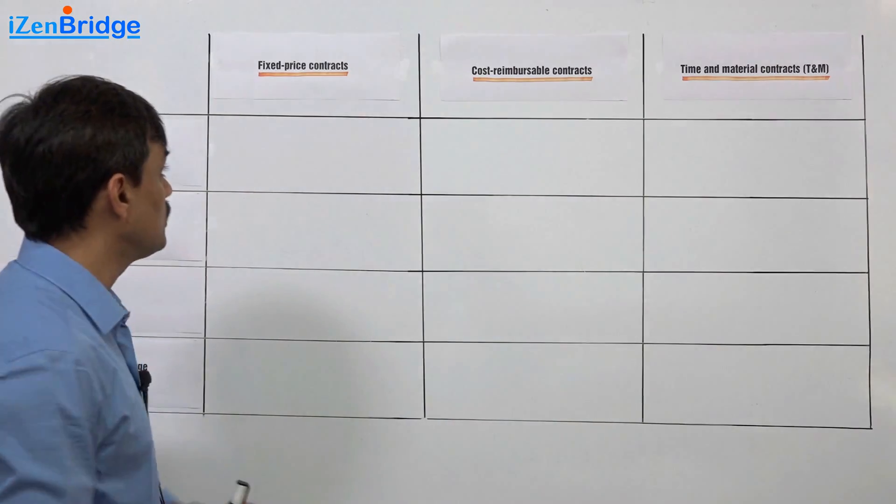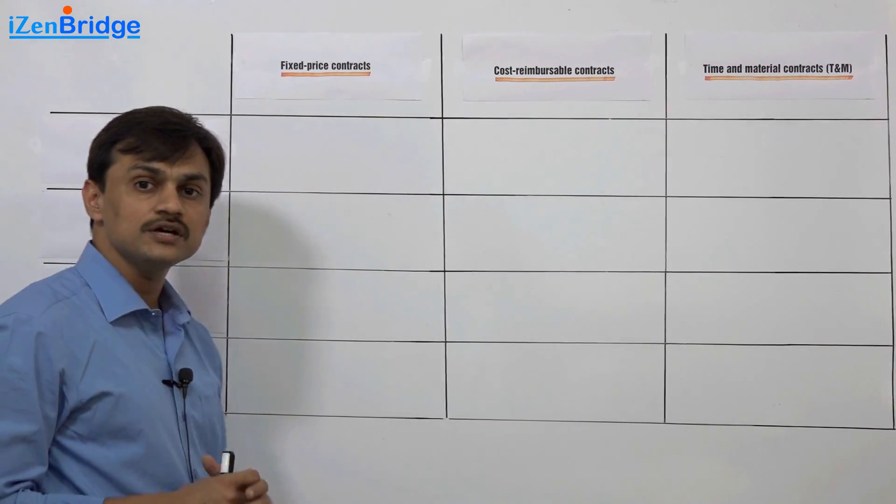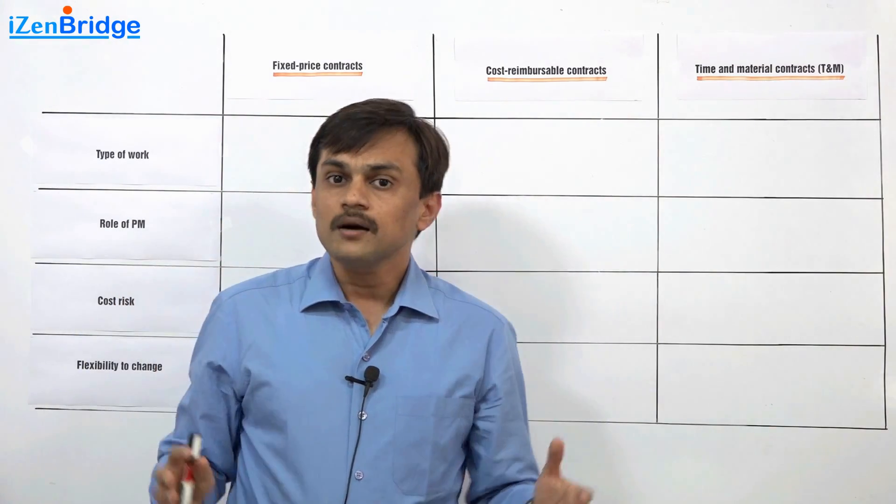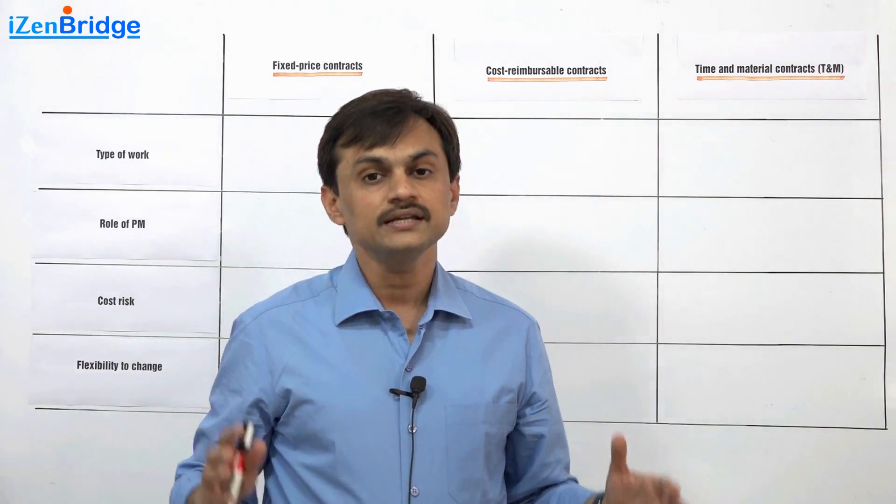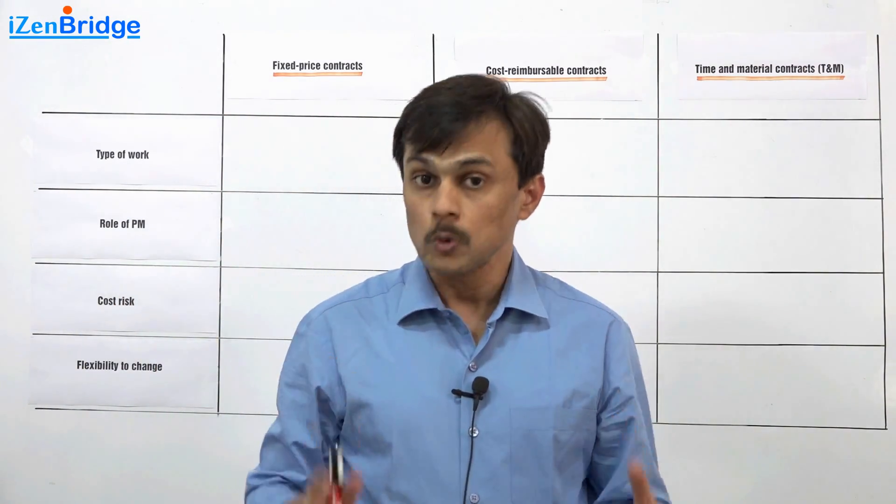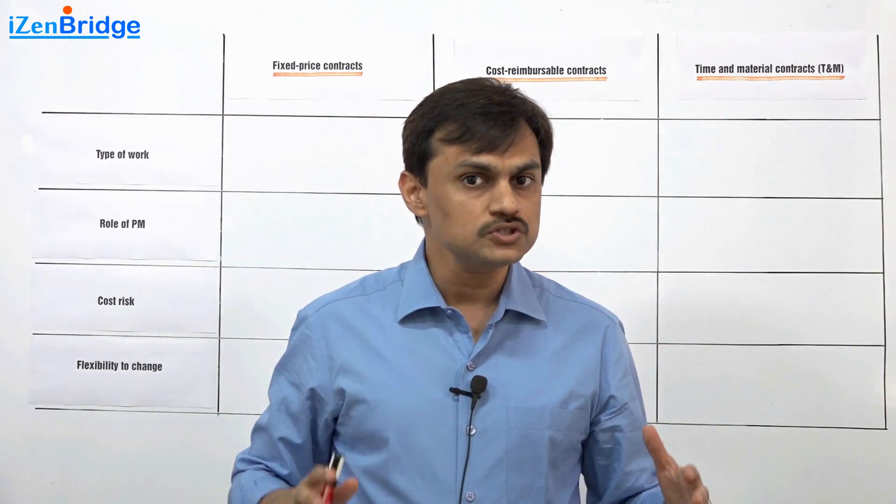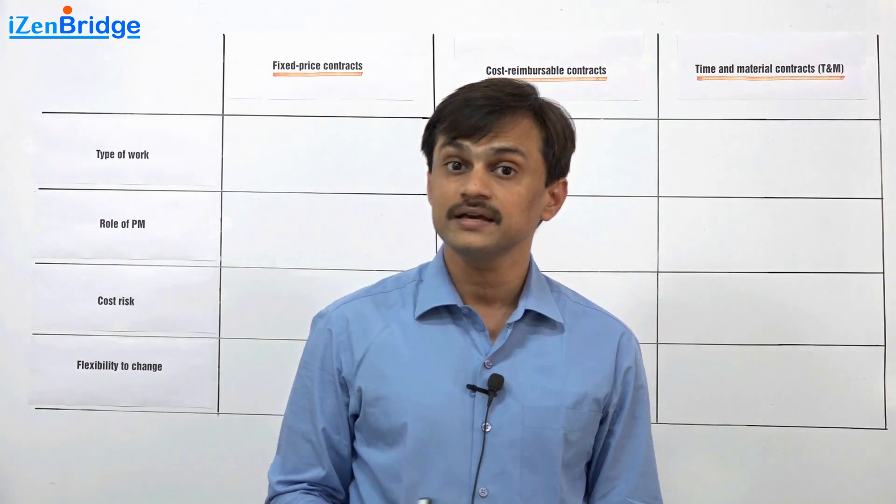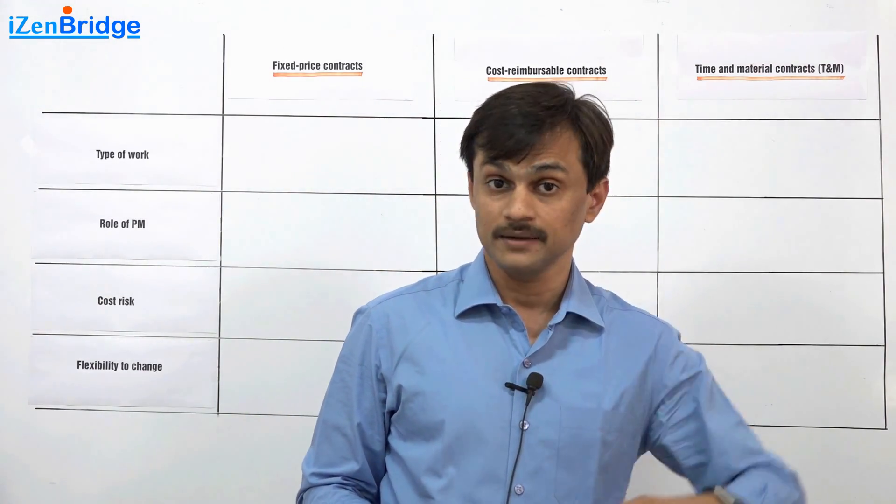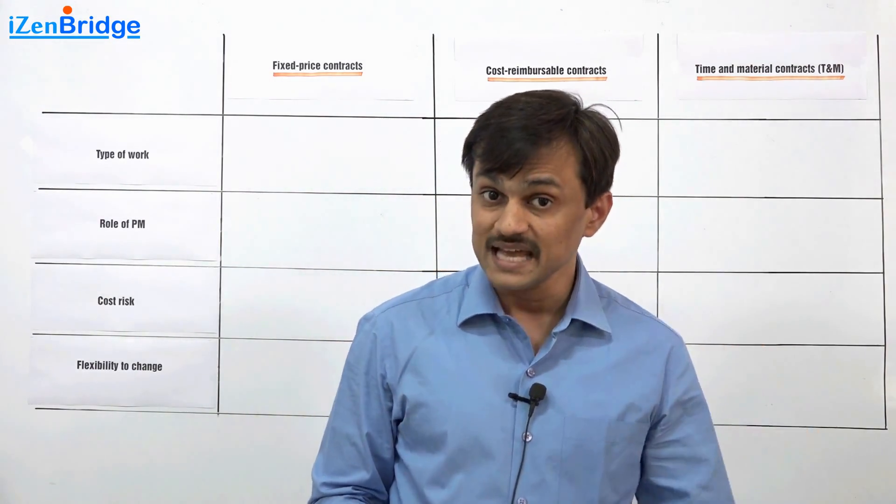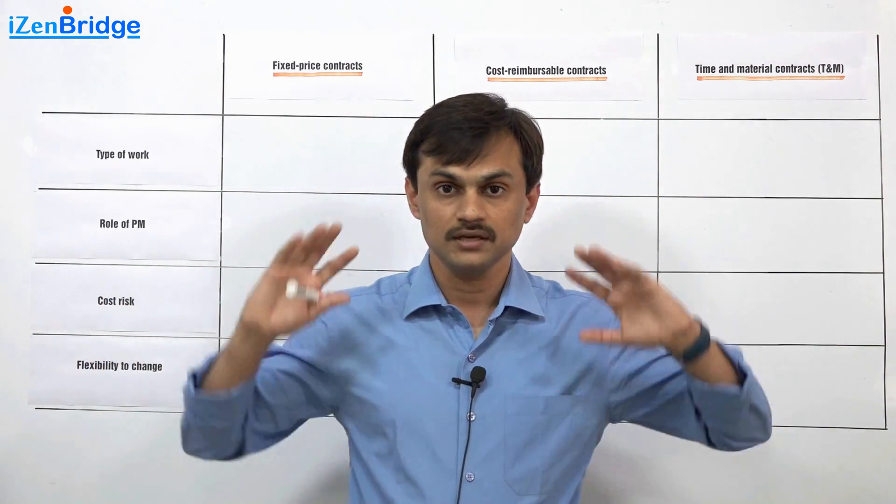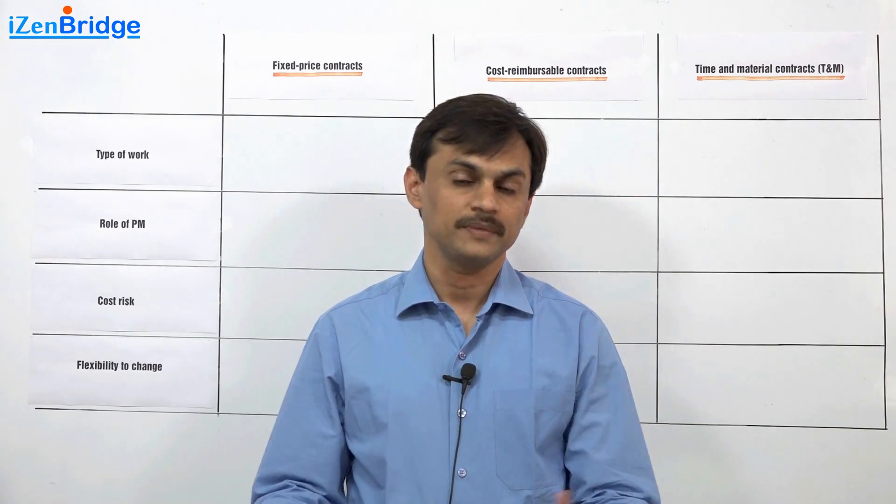So let us look at type of work. Fixed price contract. You can commit for a fixed price when you really have an idea of the scope. Without knowing scope, if somebody commits for a fixed price, then the project is going to fail because someday either buyer will feel he committed wrong or the seller will feel that it was a wrong estimation and it is not making sense.